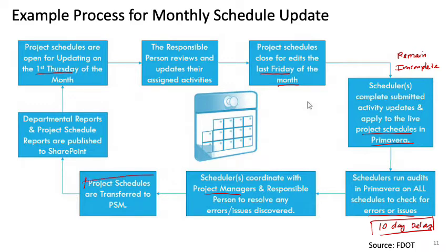So you have a new schedule, and this new schedule will be propagated into the system and shared with everyone else in the project, and this new schedule will be used again as a baseline. This baseline will be published and shared with all the project members, and that is the start of the new cycle. So you use that new project schedule as the baseline for the next cycle.